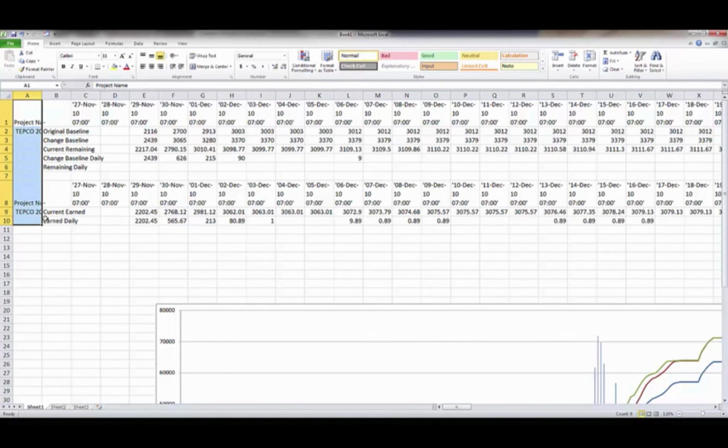You can run a batch on those 6 reports in P6 and save them off to a share drive or your C drive, and then you can come in to Excel and write a macro or record a macro to open all of those files and copy and paste the data in to the areas within your dashboard report that you need the data pasted into.